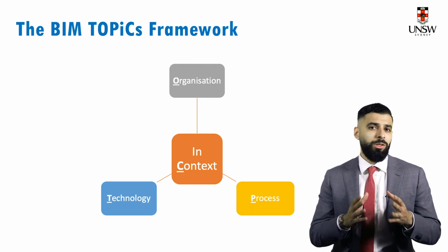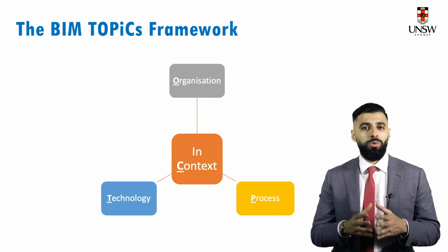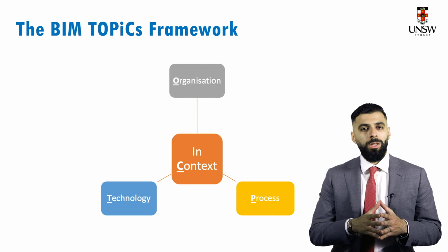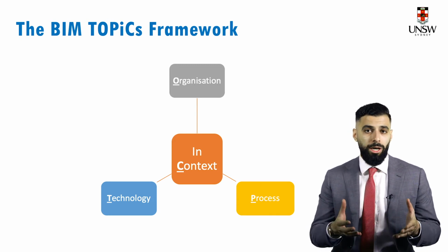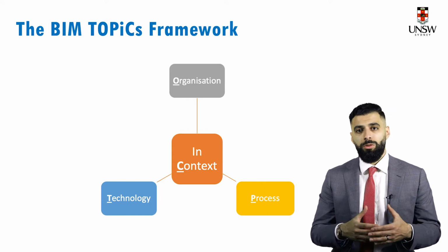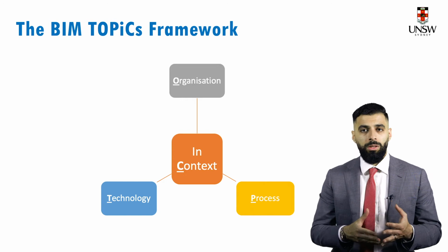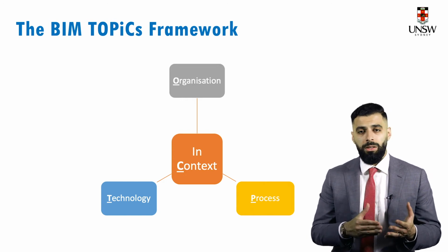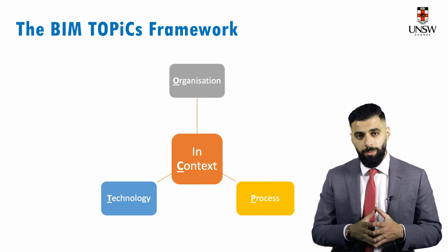Well, in the technology part, you need to decide which 4D BIM platforms to invest in. Moving on to the organization component, your contracts will need to reflect the use of 4D BIM for simulation, for schedule determination, and for payment approvals. You may also need to coordinate with suppliers for material delivery schedules, for instance.